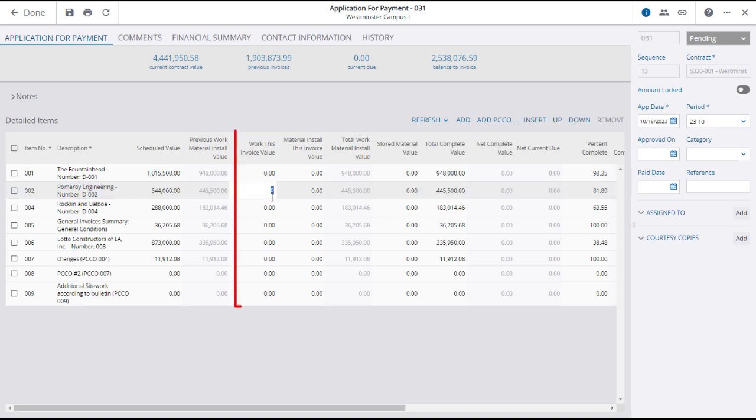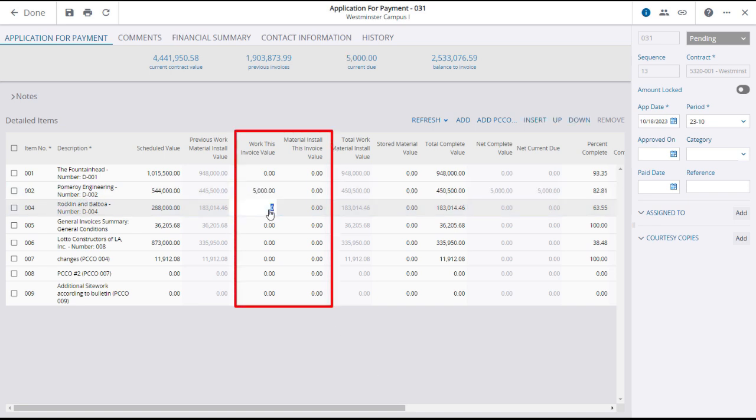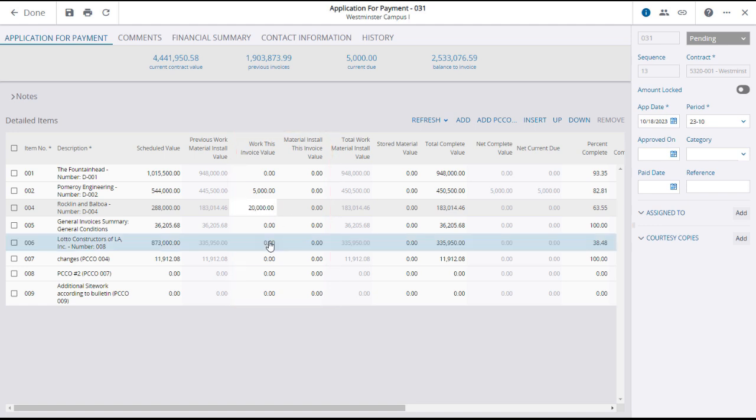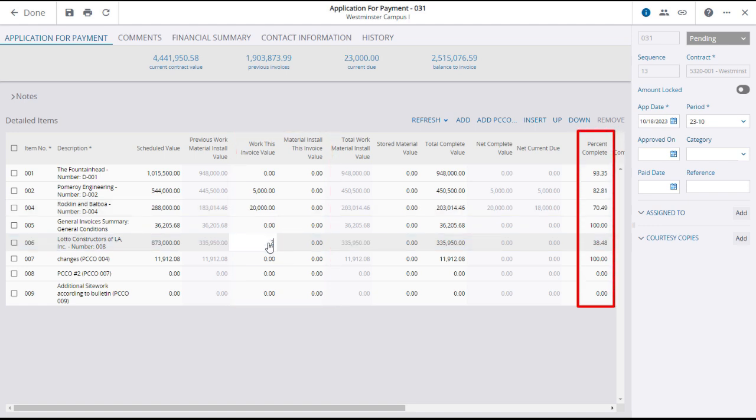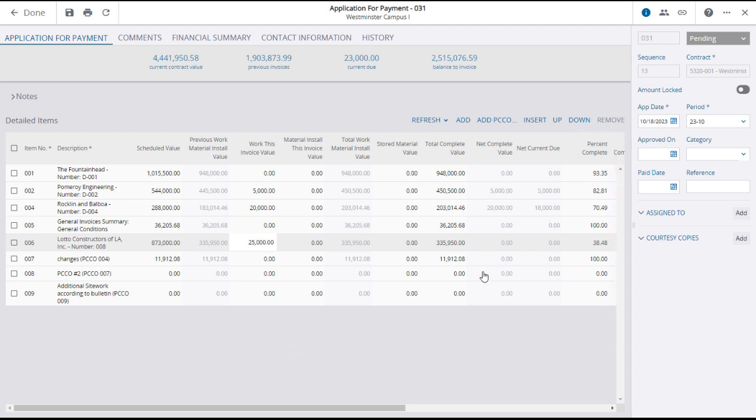You'll need to enter the invoice or material installed values to be paid in this application. Or you can enter the percentage complete values for each item. These numbers will be reflected in the summary.